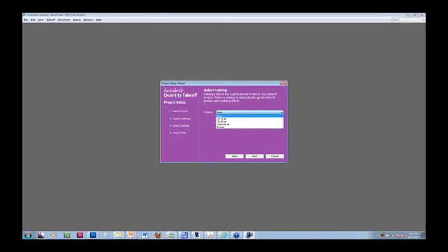The catalog is the way of organizing your models and your data into assembly, pretty much what you would do with an Excel spreadsheet or with an estimating program. It will pretty much generate all the data that you already have and allows you later on to link and map it to the model or to a 2D element if you have a plan, if you don't have a BIM model.